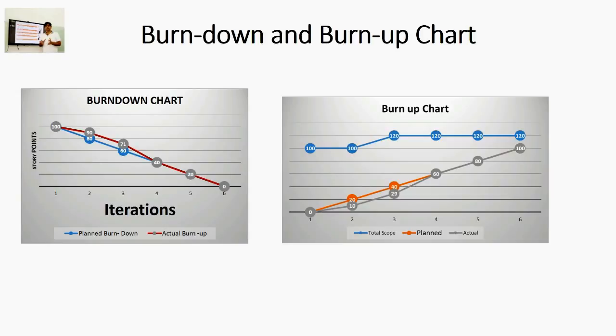In this video, our focus would be on burn down and burn up charts. Burn down and burn up charts help in tracking the progress of the project. They also help in forecasting when the project or release within the project would be completed. The burn down charts show the estimated effort remaining on the project, whereas burn up charts show what has been accomplished so far.